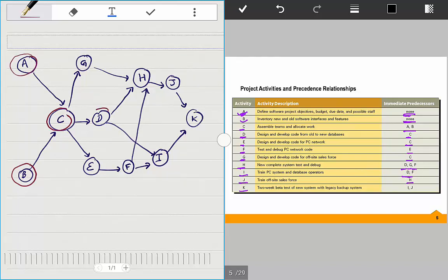To get started on D, we needed to know that we had to finish C, which eventually means that to get started on D, we need to finish both A and B, then finish C, and get started on D. Right? But when we sequentially build it, we only need to know immediate predecessors. Okay? The first part of the course, this skill is very important.